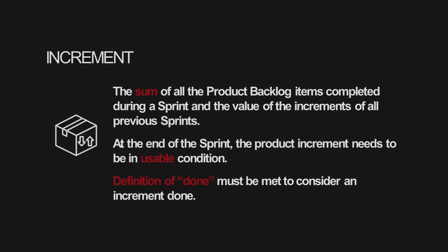In order to know when the increment is done, the development team has to create the definition of done. It describes conditions or quality criteria that the product has to meet when the work is completed. This definition of done does not change during the sprint, even if the team runs out of time. With experience, it will become more comprehensive and have higher standards.